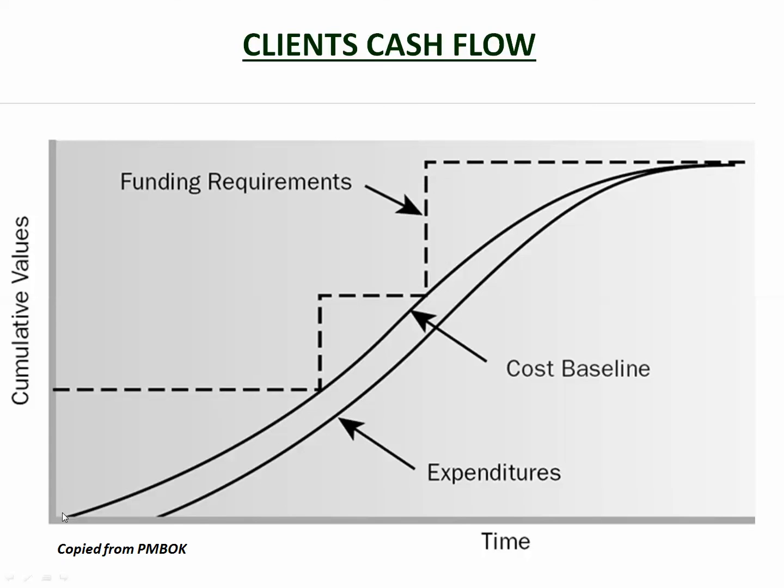So we're talking about the big picture here. So we're talking about a project, say a client wants to build a building or something like that, from initiation all the way through to completion. So at the start he'll hire a consultant, he won't be spending too much on the feasibility, then he'll get into the design and he'll be spending a bit more money, then the rate will pick up a bit. Then the construction happens and the rate steepens, they're spending more money as they go, and then towards the end of the commissioning it's tailing off as the contractor has been paid most of his money and he's just finishing everything off.